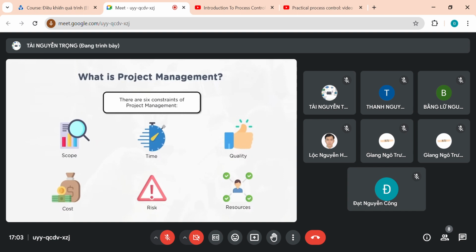Similar to that, we have quality management specifications which are defined, and the project output will be accordingly achieved. Risk: every project is taken up for a specific reason by an organization. So the organization should assess the risk associated with the project, and as the project progresses, various different risks have to be identified, like risk related to project management, technology area, resources, and financial things. So broadly, risk management plays a very important role. There will be something called a contingency reserve kept for an identified risk above the cost which is estimated for the deliverables from the project.